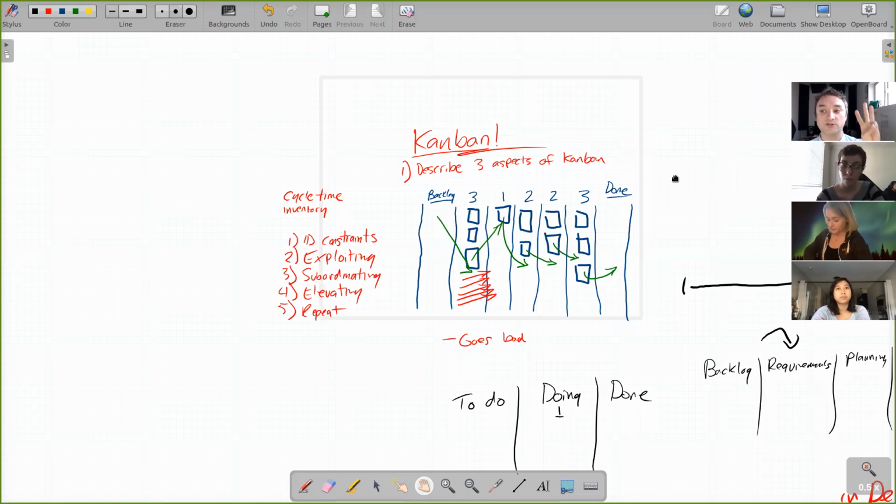You have to have these 3 roles on the team. They are allowed to do these things. They're not allowed to do these things. On the final day of a sprint, you demo and then do a retro. It's not a requirement in Scrum, but you can size the stories as user points. We didn't talk about velocity yesterday, but that's one of our estimation tools. That's a rigid process.